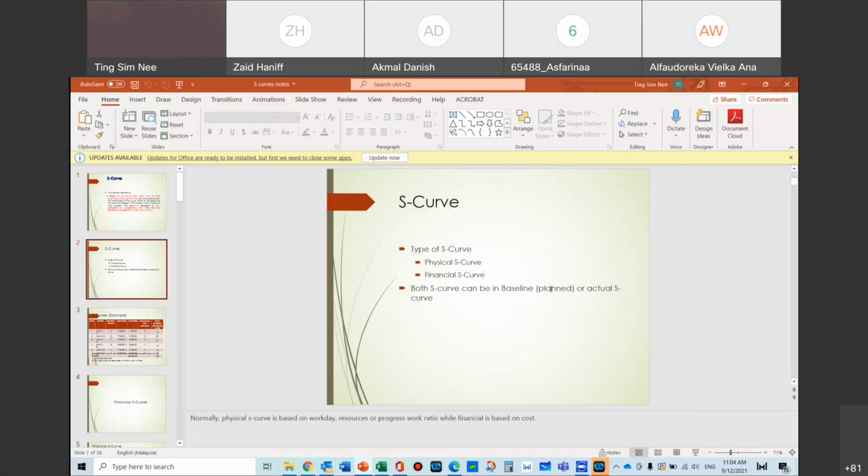So typical S curve, you have two types of S curve. One of them is called physical S curve, and one of them is called financial S curve. Okay, so both we will explain here. So the S curve we are creating is the background S curve, like a baseline S curve. Remember, these are techniques to do control, and S curve can help to control both time and cost at the same time. This is a quite good technique to do both.